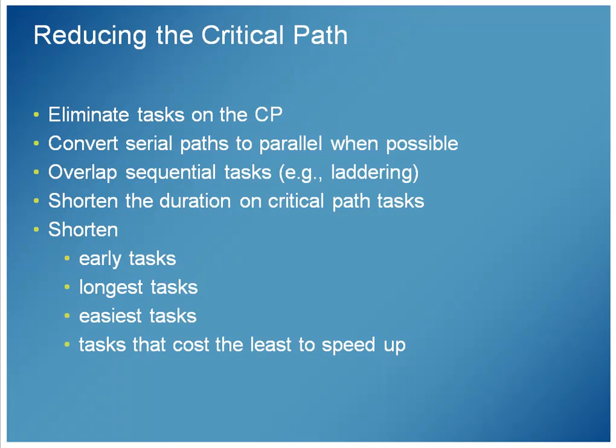Convert serial to parallel. See when things actually can occur at the same time, instead of having to wait for the one project to finish. If you have to leave them serial, you can't make parallel, then say, well, can I at least break it into sub-steps? Are there elements within each step that maybe can have some hammocking going on, or some laddering going on there? Hammocking was more abstraction. Laddering is where we break it into sub-steps and get efficiencies there.